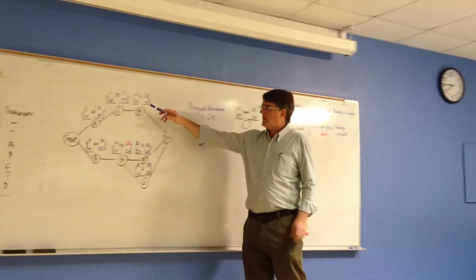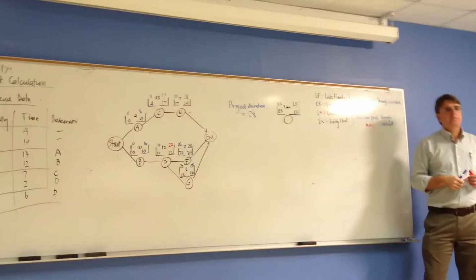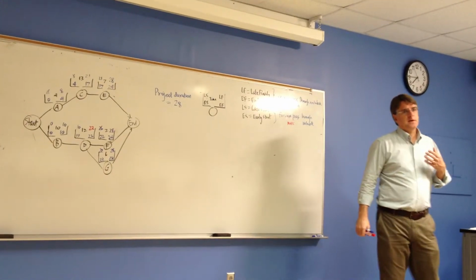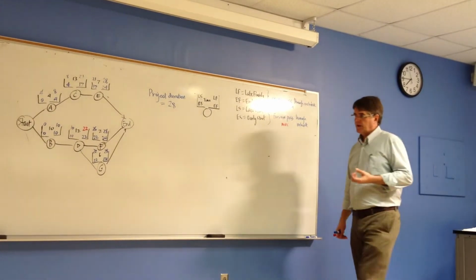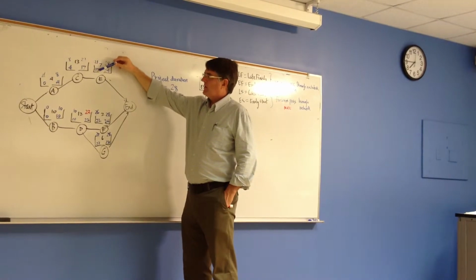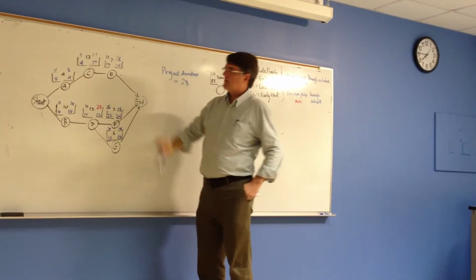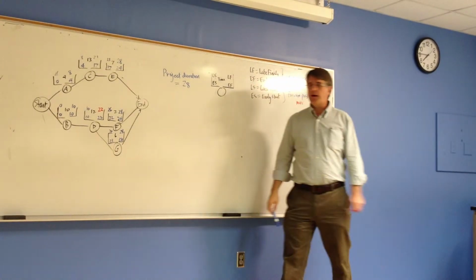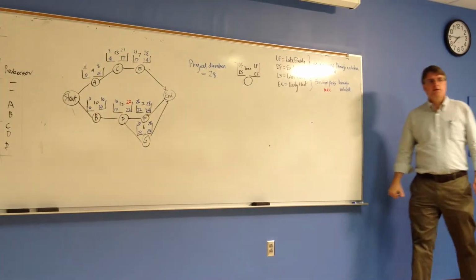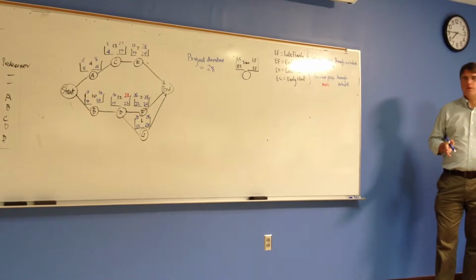I know the early start, early finish, late start, and late finish of all of these activities. These are useful numbers to give to contractors. Some of them are 4 days apart. You tell the contractor, you might start on day 17. The latest we're going to get you out here is on day 21. And the finish times would be pretty much up to the contractor. You need to give the contractor a sense of when they need to get out here.